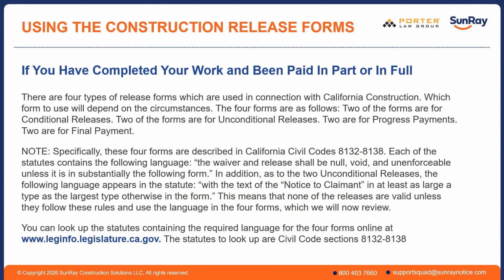One of the things that can be a gotcha is when someone asks you to sign an unconditional release in exchange for a check, because the check could bounce. If you have given an unconditional release, that means that you have released your claims to a mechanics lien, a stop payment notice, or a payment bond claim. These are really important remedies for you, which are the subject of another webinar or several webinars we can do at a later time.